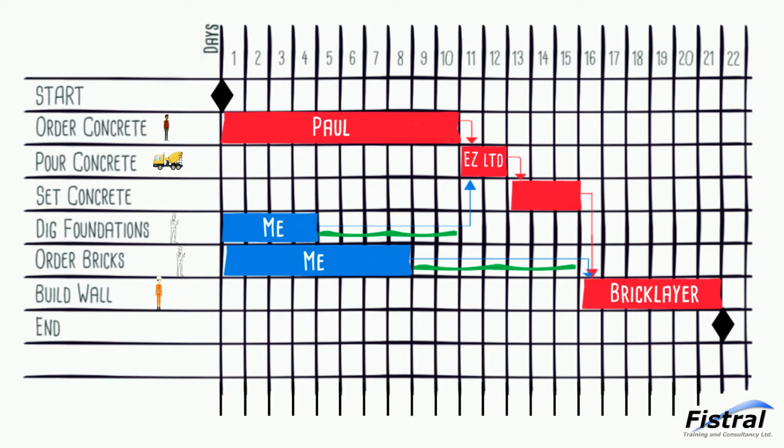And now what happens, and the computer's actually really good at doing this, is we calculate our resource profile for the project. Basically, who is doing what and when. This should be done for all the resources, people, equipment, materials, facilities and so on, that you're going to need across your project. But for the sake of simplicity, here I'll just look at my own resourcing profile.